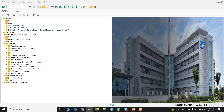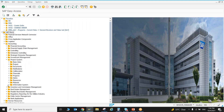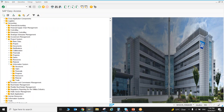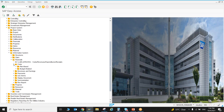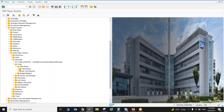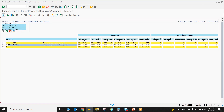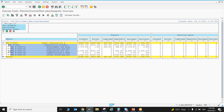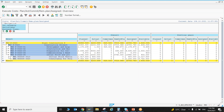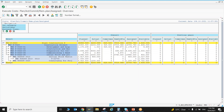The same detail can be seen in the project cost report. Go to Project System > Information System > Financials > Cost > Plan Based > Hierarchical > S_ALR_87013533 report. You can check here — the initial stock entry and the service 'Consultancy for Project' with the total plan value and the actual cost posted are both visible.